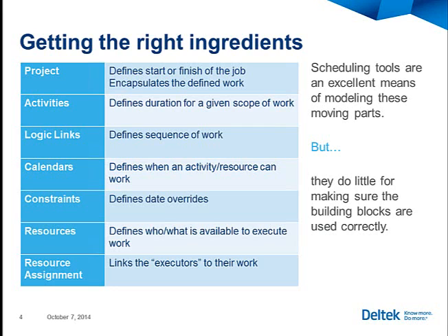We don't always have resources available on Saturdays and Sundays. So when I see a project that has a 7-day-a-week calendar, 24 hours a day, I become skeptical pretty quickly, because I don't necessarily believe that the project team has resources available to them to do this work 24/7. Maybe they have 5 days a week, 8 hours a day. Maybe they have 9 days across 2 weeks, 9 hours a day, which is becoming increasingly popular.